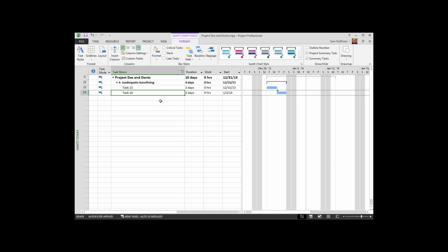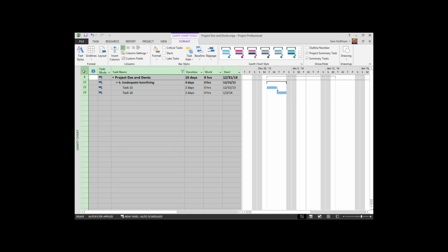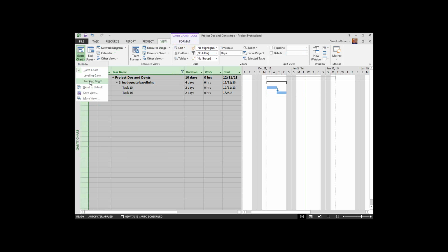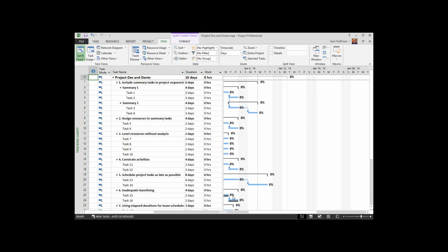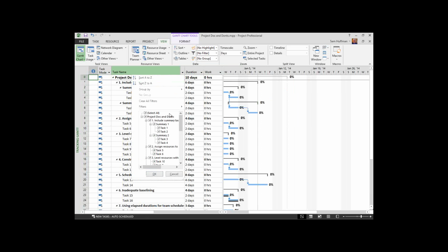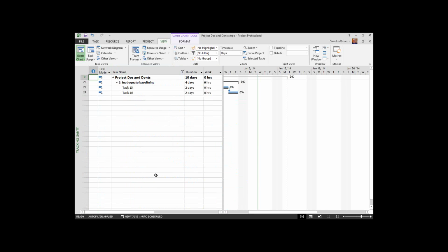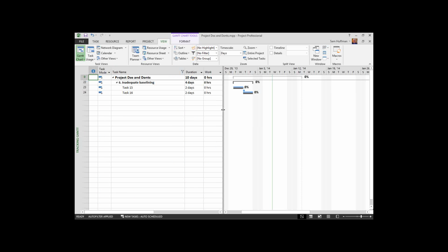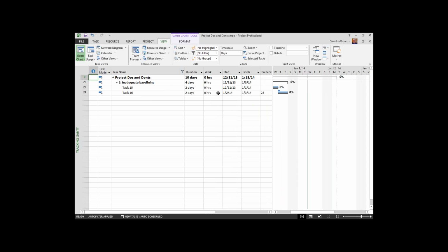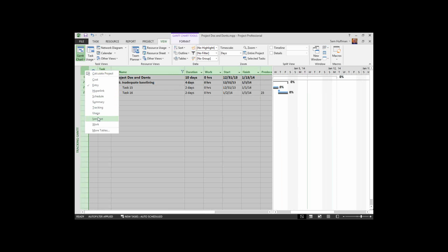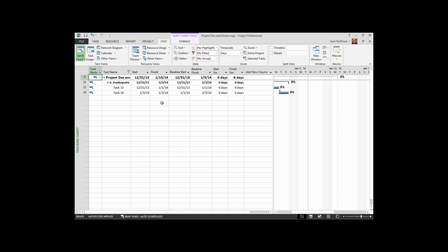I'm going to turn it off so I can show you yet another type of Gantt chart. This is called the tracking Gantt. We've seen the leveling Gantt. Well, this Gantt chart is going to show us tracking. And once again, I'll filter out all the details of this. Okay, so here is a tracking Gantt. By default, it's going to show us the baseline, as well as via tables the idea of variance. Now, right now, in this table we've seen no variance because we're not tracking at all.